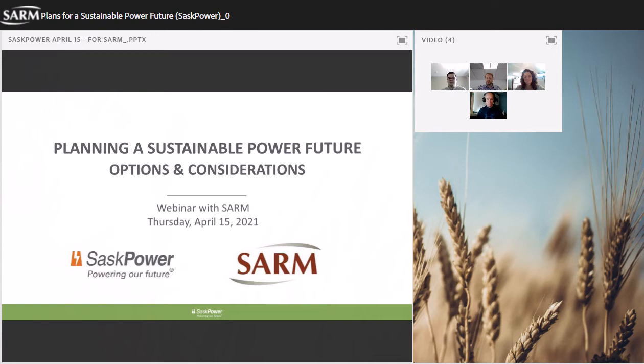So as far as starting this planning phase, we've got the site evaluation and technology selection. We need to get those two things moving and underway, and we're in the process of advancing those two areas. And that's going to lead into those regulatory processes. So you can see the 3 bars in the middle here identify a license to prepare a site for a nuclear facility, which is the first one, followed by a construction license and then an operating license. And you need all 3 of those leading up to a commercial operation of this type of facility.